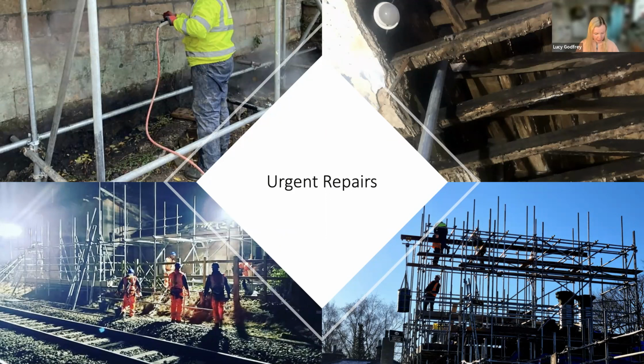Also during the urgent repairs was stonework repairs on the trackside elevation. The main point was trying to get all the trackside works done during this phase of works, so we would not need to go back and impact on the Network Rail infrastructure in the future.